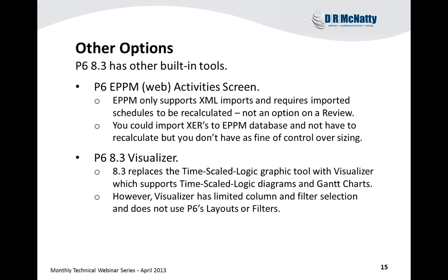So what are some other options? Well, there's an activity screen in P6 Web or P6 EPPM, which, at first thought, you could use. Well, a couple of problems with using the web activity screen. EPPM only supports an XML import, so you've got to get your files in an XML format. And it also requires you to recalculate a schedule when you pull it in. Well, I don't want to recalculate a schedule that I'm reviewing, and I told you why. So to me, it's just not an option on a review.